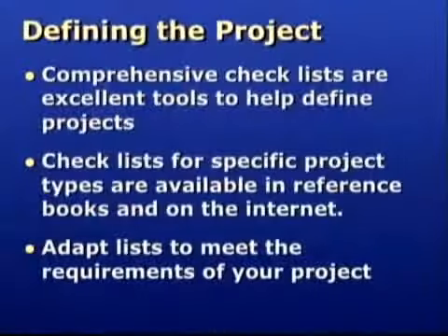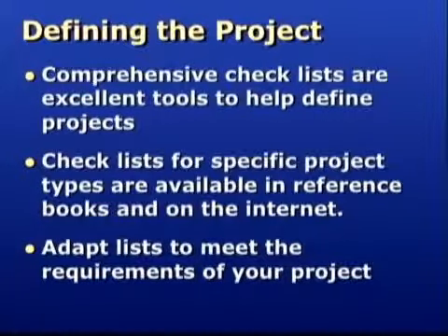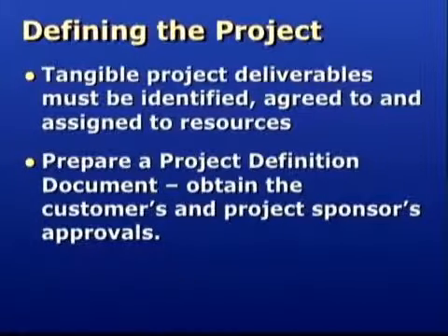I found the best tool to help define a project is a comprehensive checklist which details all the pieces of information needed to effectively define the project. Checklists for a variety of different projects are readily available in project management reference books and on the internet. Of course, you will need to adapt these lists to meet your organization's specific project needs. Also, if the project is producing tangible deliverables, then they must be identified, agreed to, and assigned to the appropriate resources. The define stage of the project is complete when the project manager produces a project definition document and gets it approved by the key project stakeholders.